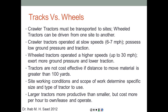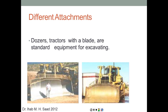Tractors are not cost effective if material needs to be moved more than 100 yards — in that case another piece of equipment should be used. Site working conditions and scope of work determine the specific size and type of tractor to use, and it's part of the project manager's job to improve site conditions or select appropriate equipment. Larger tractors are more productive than smaller ones but cost more per hour to own, lease, and operate, so there is always a trade-off between higher production and higher cost.